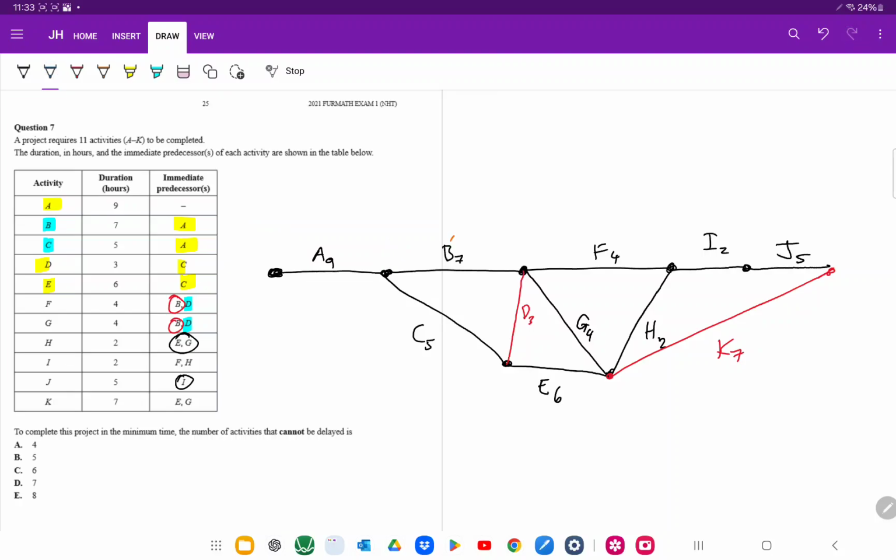I think the important thing before doing this question is working out the direction of the activities. So, A can go that way, B can go that way. D goes that way. That way. That way. That way. That way. And that way. If we investigate the values for this now, we can see that 0 will go there, and the earliest start time for this one will be 9. The earliest start time for this one will be 9. For this one here, we'll get 14. And for this one here, we'll get...